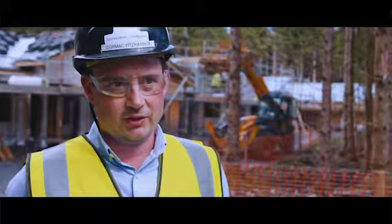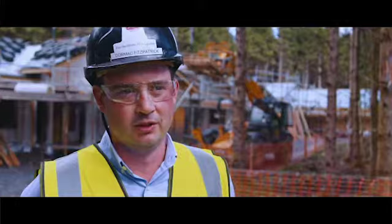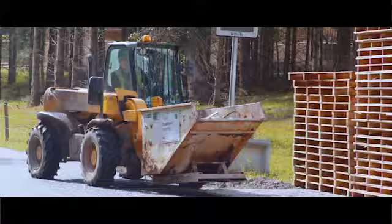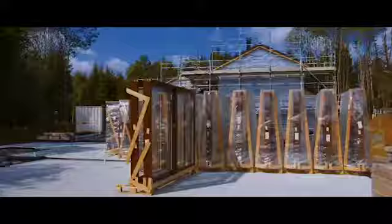Following the exercise, we identified the areas of waste, and we reviewed those and we tried to eliminate them where possible. I suppose methods of elimination include a change of detailing to make things easier, to make some activities simpler and quicker, and to look at how the crews were set up, how they managed materials and accessories.